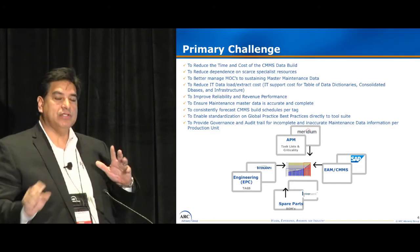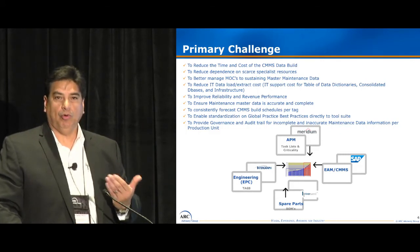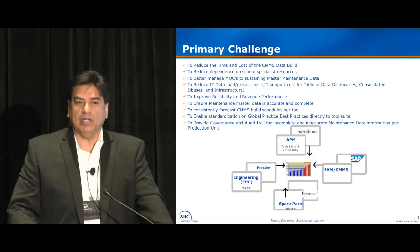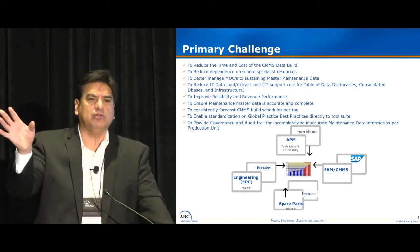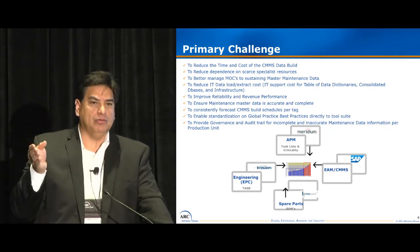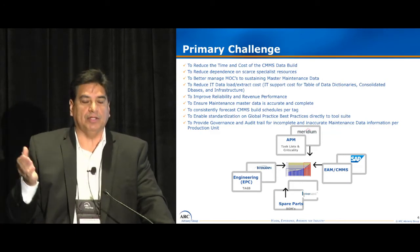It was an analysis that we did to determine the attributes associated with every past greenfield project to look at the data. So we did an analysis. We said, okay, let's sit down. Let's look at quantitative data and let's look at qualitative data. Let's look at the attributes that are important to an organization. I'm just going to pick on one, manufacturer model serial number, just to keep it simple. So you go back and you go, wait, manufacturer, that changed 5 years ago. Okay, were there any changes to the record? There's no changes to the record. So as far as we knew, we were still ordering the old stuff, which caused the delay, yada, yada. You guys get it. It's a domino effect right there.